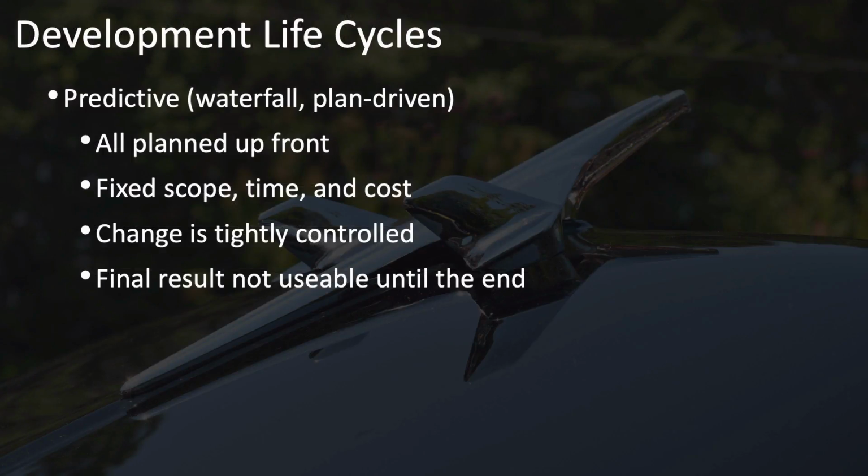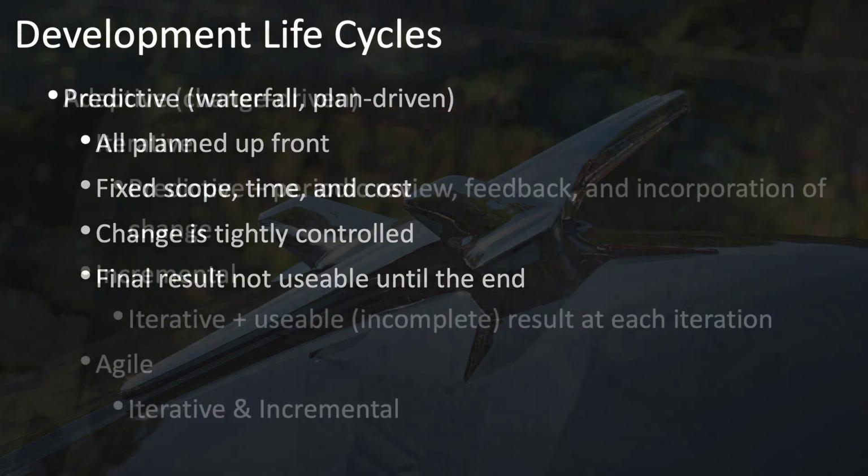For the exam, you should also be familiar with the basic development life cycles, the first being predictive, the waterfall or plan-driven approach in which you plan everything up front, you fix the scope, the time, and the cost, and then tightly control your change, and generally you don't have something that's really usable until the project is done, such as building a house or a building or a bridge or a freeway.